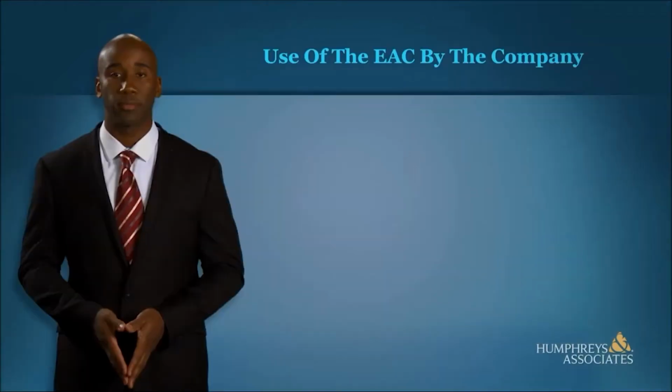Internally, the uses of the EAC are fairly obvious. Resource planning is an ongoing activity. The overhead bases are continually being analyzed. In an earlier part, the overhead rates were calculated, and we had to forecast how much work there was left to be done. The reason for that exercise was to apply the correct overhead rates. Part of the EAC process is assessing the future direct base forecast.